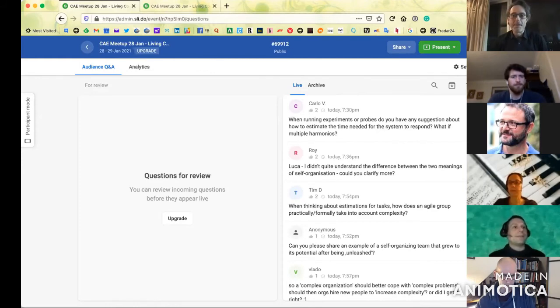So this is a very good question. And I don't know if there is something about the name Carlo, but Carlo basically asked exactly the same question the other time. Two things come to my mind. One is that sometimes what you are doing defines the when. For example, imagine that you have a fixed event. It could be Black Friday, or a Formula One race if you are working on software for a race, or any event. And you're trying to solve some problem. Well, that deadline becomes the moment where you take a check on what's going on. It becomes a checkpoint, an externally imposed checkpoint. And in that case, you may repeat that checkpoint multiple times later on.